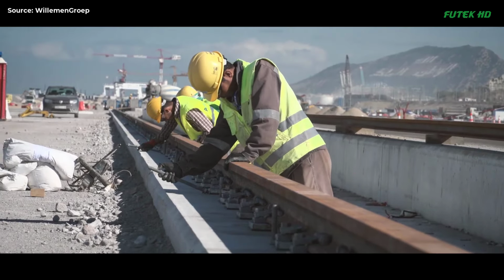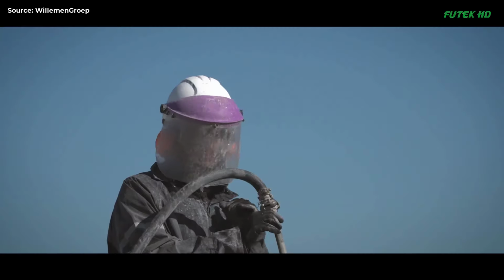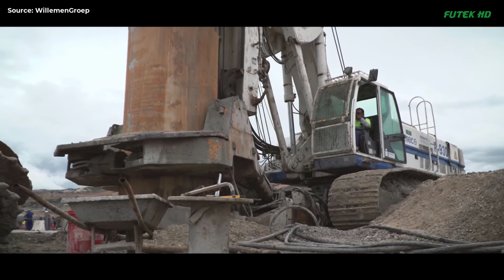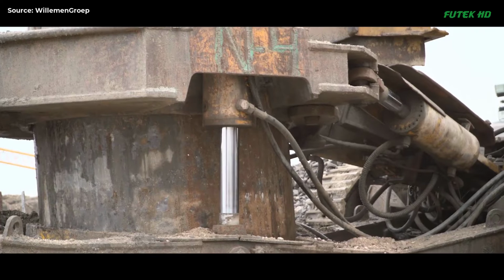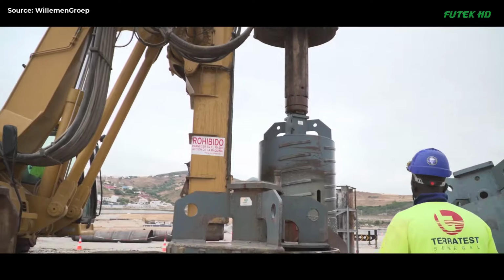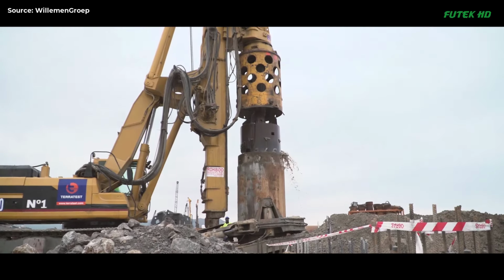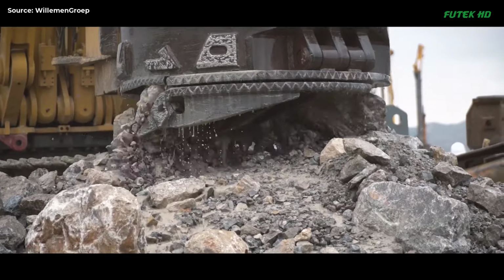The construction required significant groundwork, including the importation of 1 million tons of granular material and crushed rocks delivered by self-discharging vessels from Norway and Scotland. The container stacking cranes were mounted on 14-kilometer rails, necessitating solid concrete foundation beams. To meet the project's tight deadlines, Villamine imported 4 units of 20-meter customized steel formwork for precise 80-meter daily pouring production, using 70 tons of reinforced concrete for these foundations.